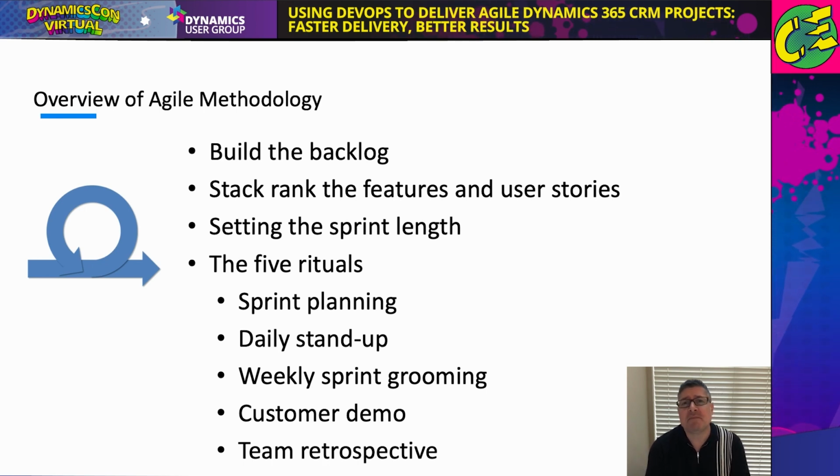There is a daily stand-up. Daily stand-up takes 15 minutes, that's it. And we simply go through the sprint backlog in a Kanban board, reading top to bottom, right to left, starting with the activities columns for the tasks. We go down, we hit the first task somebody's working on. We ask, are you really working on that today? If not, please move it back to the new column. If it is active, do you have anything that's blocking you from finishing your work? If there's nothing that's blocking you, let's keep it inactive.